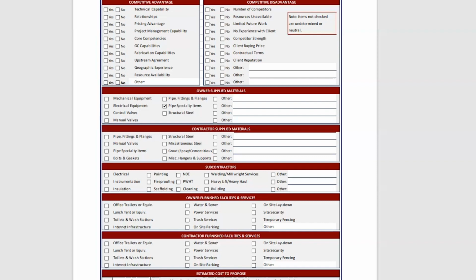And the catch there is that if the information they divulge is significant enough, now you have a basis for a change order. Right. And if you have a change order, you've got an opportunity to increase your project gross margin a little bit, and let off a little bit of the pressure.